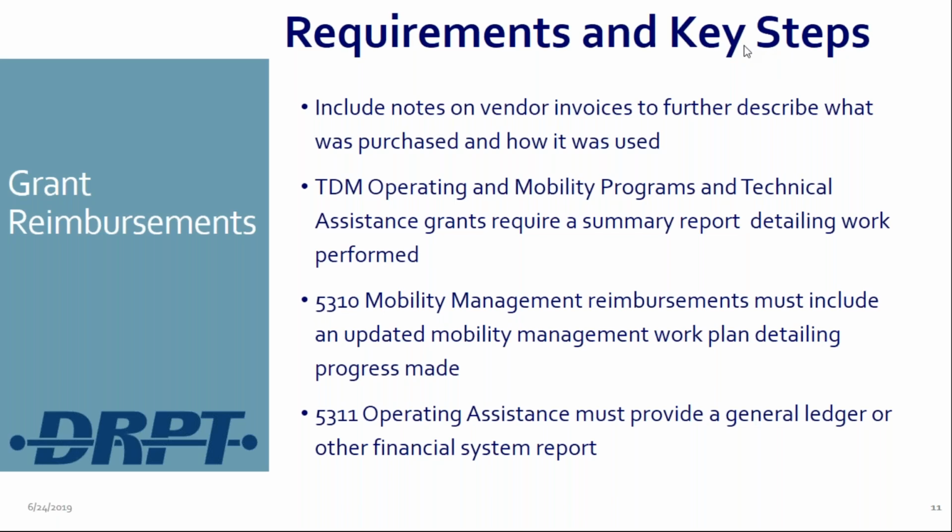So next slide, we'll be talking about the key steps of the reimbursement. Make sure that all the invoices you have, especially from vendors, are clear enough for us to know what was going on. I know a lot of the contractors you've worked with for a while and have good relationships, so you have a good idea of what's going on with the work they're doing. But for us, a lot of it's new, so make sure the invoices are clear in terms of what was done. We'll get invoices that have 2-3 word descriptions and they just don't really help us in that respect. So make sure your contractors flesh out a little bit what they did.